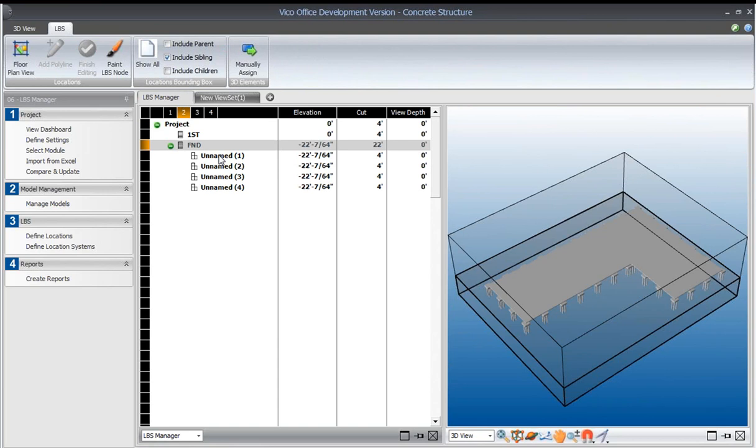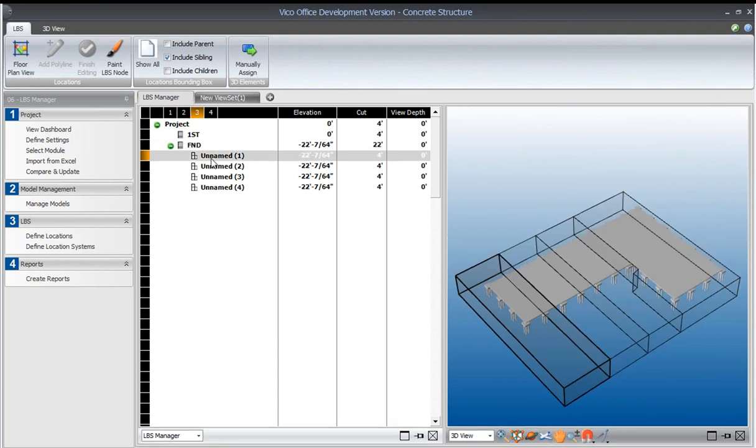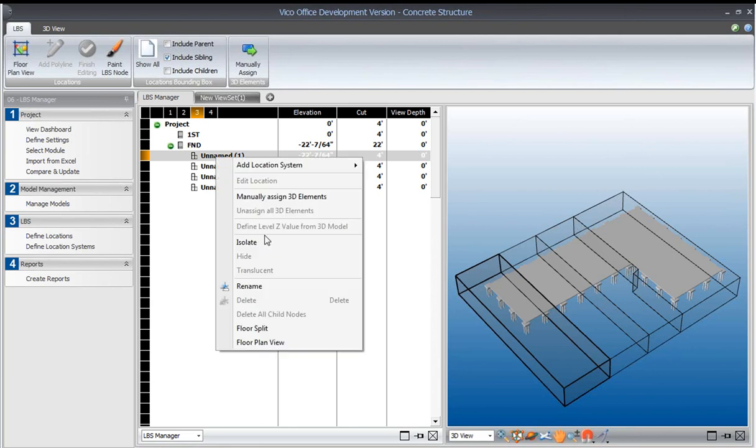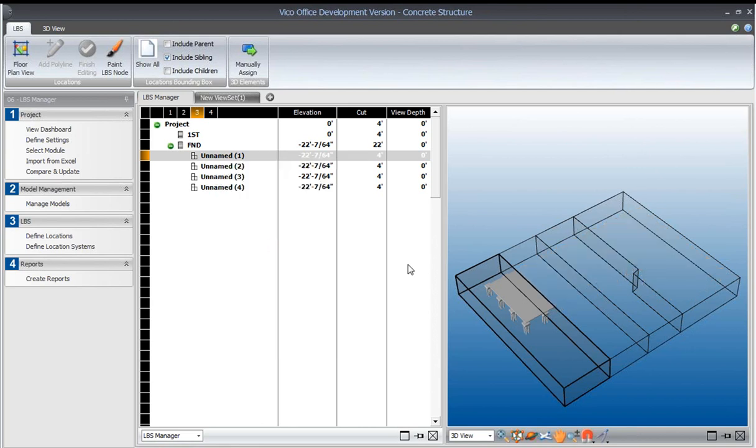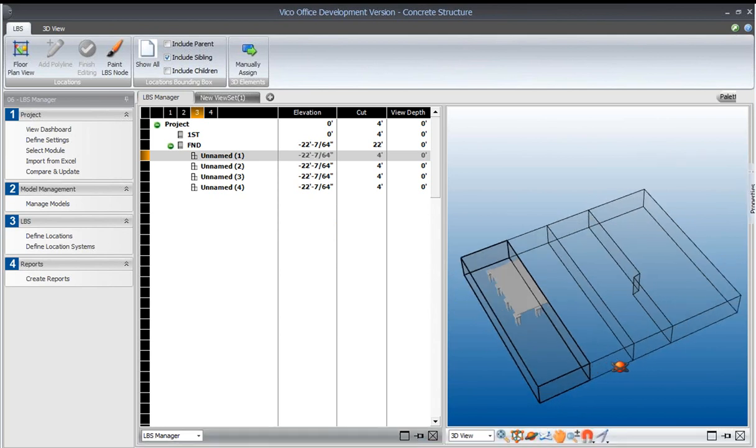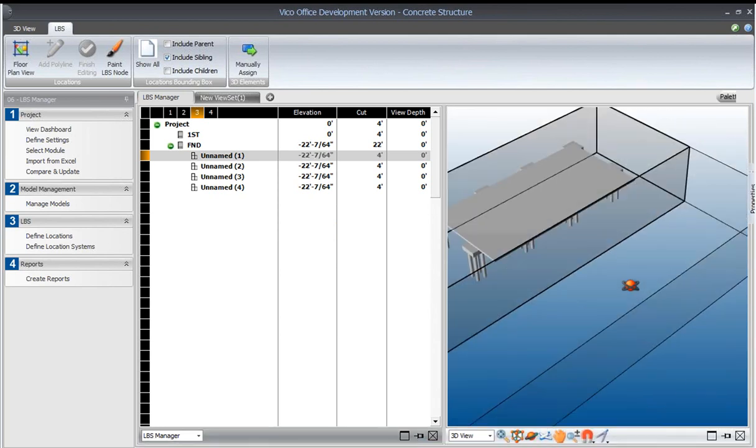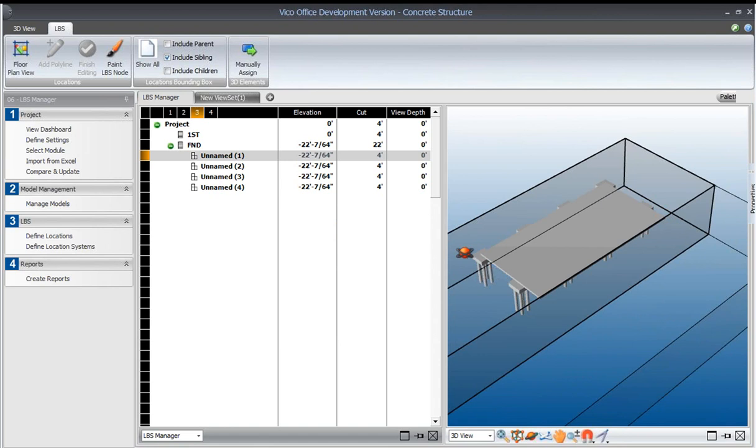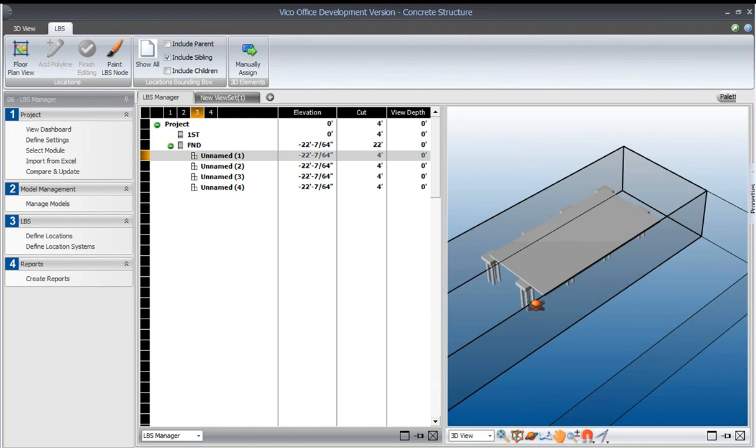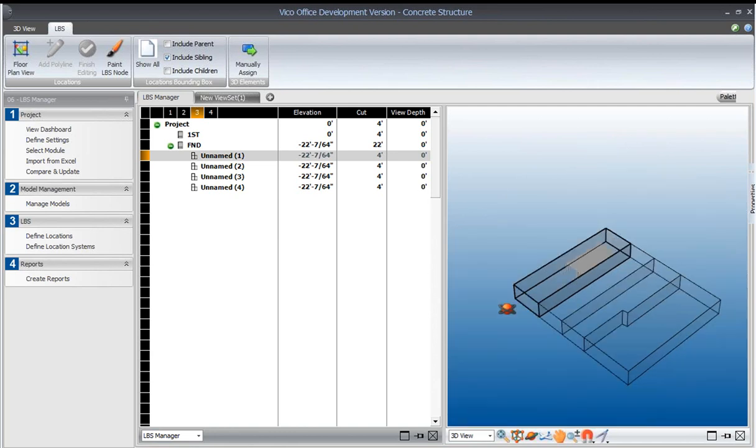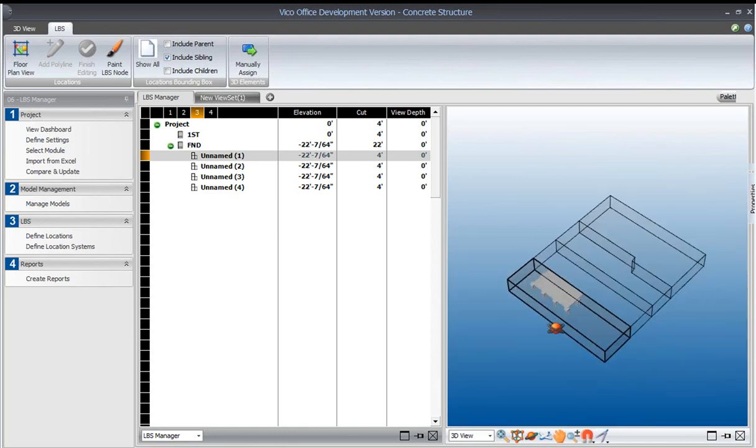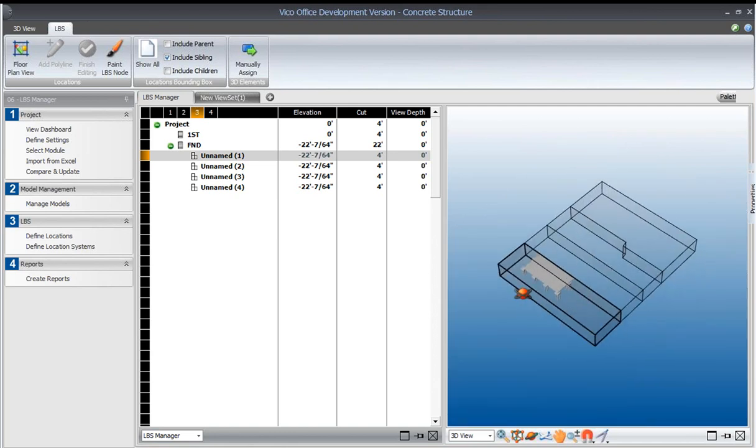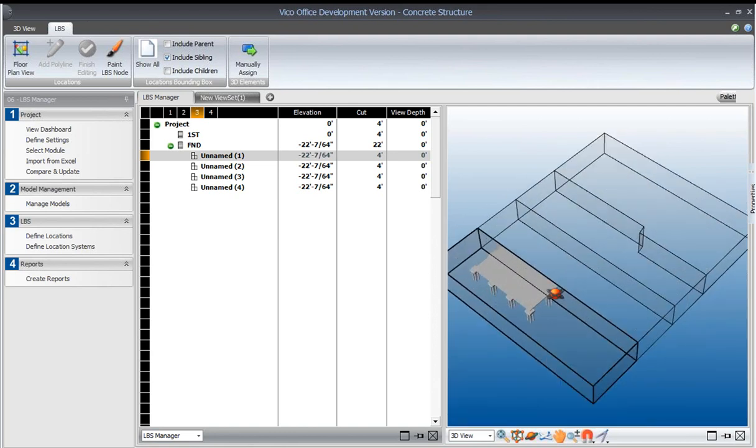We can see then that this is the first location shown here. We can isolate that item and see it's actually splitting the elements if they are crossing. For example, the slab, we're wanting to calculate the volume and the formwork for the edge and the volume used for the rebar in just that location. So we're able to use the quantities by location to generate more accurate schedule data.